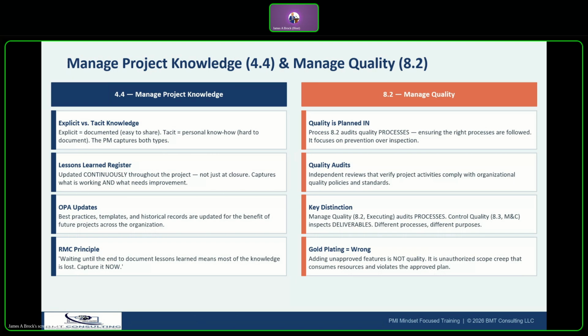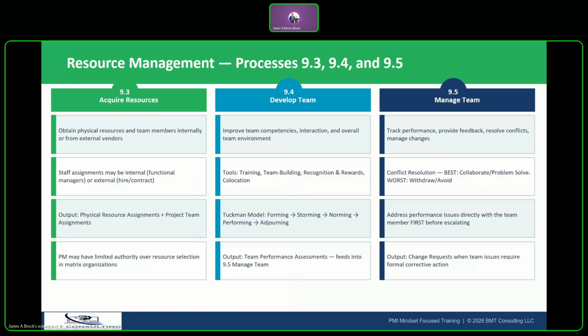So gold plating, be careful of gold plating exam traps. Students sometimes think that adding extra features is good quality. PMI says no, it is an unauthorized scope change. So please be aware of gold plating. And I know I've addressed that several times before, but it's important. So you want to make sure that you continue to look out for that.